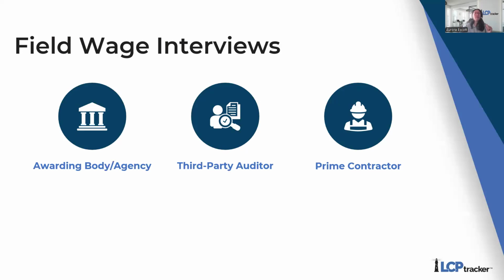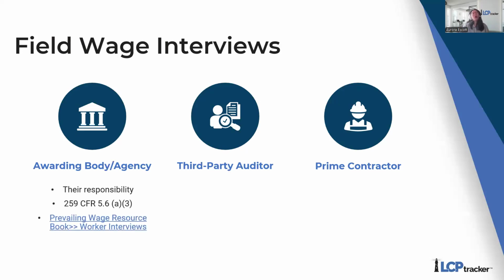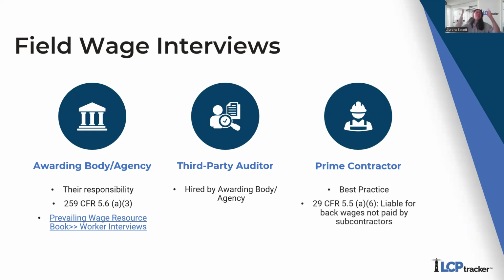Let's do a quick overview here. Really, the individuals that are responsible for conducting field wage interviews are the awarding bodies and agencies. That's their responsibility. They can contract out that work to a third-party auditor. Sure, that happens, but essentially it's the awarding body's responsibility. But you guys, specifically my prime contractors, it is a best practice for you to conduct field wage interviews. That way you can see, especially if you have over 100 different contractors at a time working on your project, okay, well, let's just do a quick pulse check to see how compliant we are with Davis-Bacon rules.